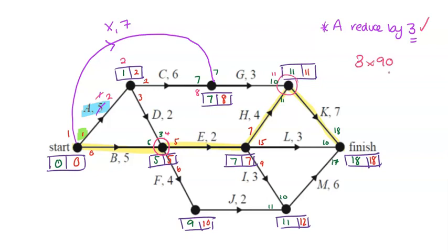It's $90 per reduction, so it would cost us $270 to do. And that gives us a new minimum completion time of 18 hours. So you can see there is a bit of work going backwards and forwards, and when there are multiple activities involved, it becomes really complicated. That's where having a clear idea of what you're looking for is really helpful in this case.